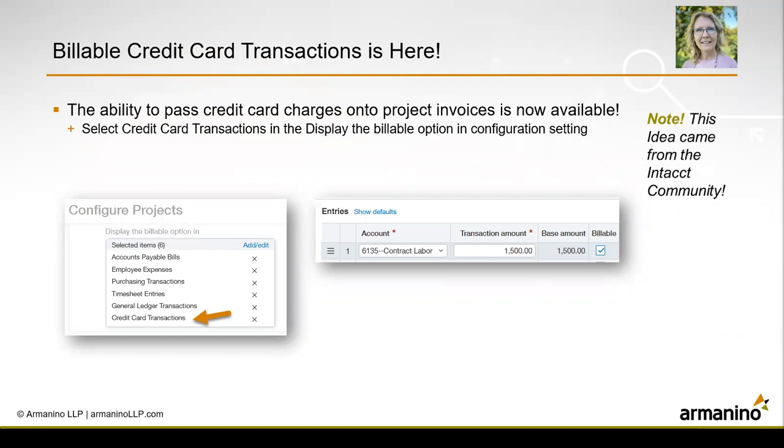Feature enhancements. Billable, if you're doing project invoices and you have credit card transactions, you can now mark them as billable. Go in to configure your projects and add credit cards as billable for your invoices, and you will get the billable checkbox in your credit card transactions.